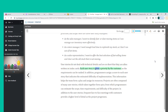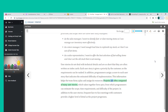Each user story is given a priority by the customer so requirements can be ranked. Programmers assign a score to each user story indicating the estimated difficulty of implementation. This information helps the team form a plan and assign its resources. Projects are often composed of many user stories which, taken together, form epics, for which programmers can estimate the scope, time requirements, and difficulty. Frequent face-to-face meetings with customers provide a higher level of detail as the project progresses.